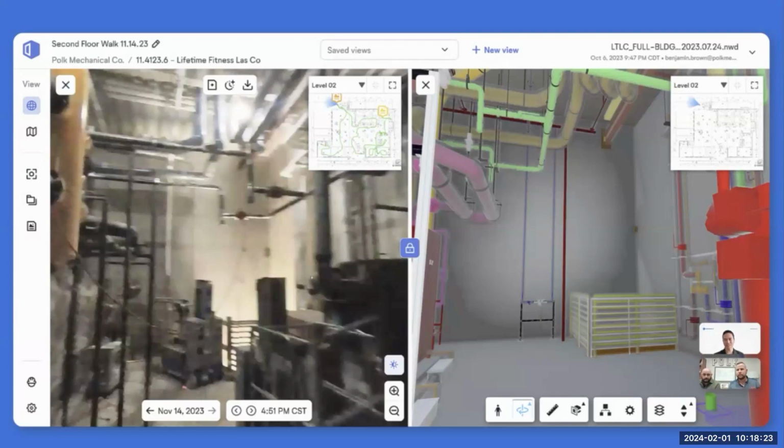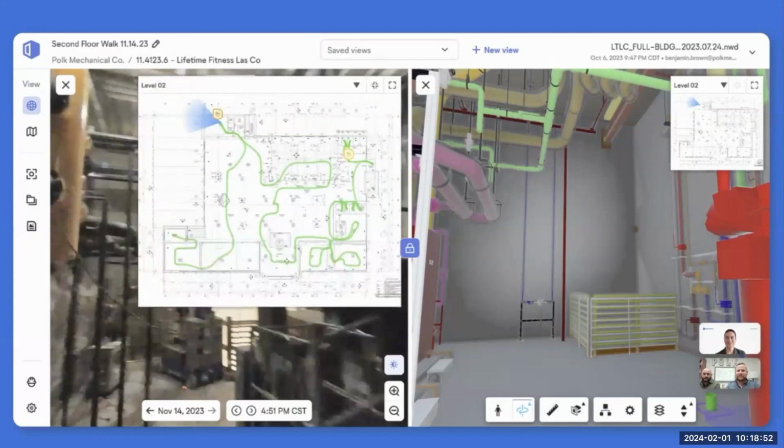You guys are already billing for that. So, go back and make that adjustment and then resubmit. So totally get that. Totally love that. Yeah. You just came at it from a GC standpoint there, trying to catch us for overbilling. Well, but no, exactly. That's what we always were looking out for. So yeah, no, for sure. I mean, it's like, hey, you were trying to charge y'all for 50% of level 2, and the GC is like, hey, guys, you haven't installed 50% of this scope. So totally get it.